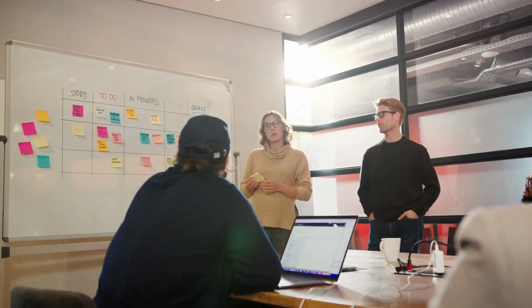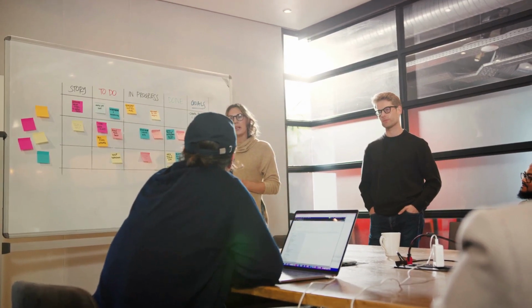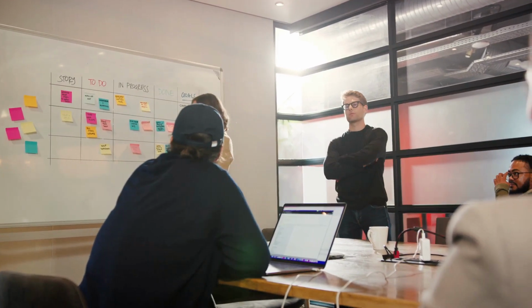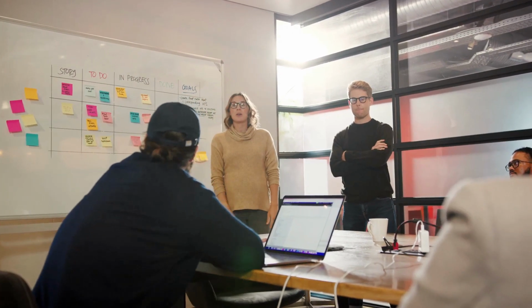Step 4. Allocate time to pay off the debt. This is a crucial step. Dedicate a certain percentage of each sprint to address technical debt. It could be as little as 10% or as much as 20% depending on the size of the debt.